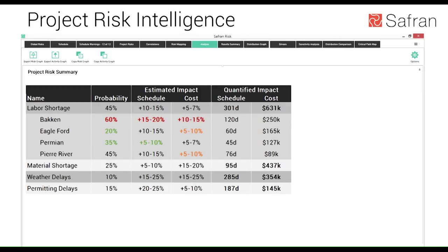From there, we're able to roll those results up, from a project level up to an enterprise view. That allows the organization to understand the impact of those risks across all projects. The benefit to the organization is that within their project controls or risk environment, they now have better insight into what those risks truly are, what their impact is to the projects themselves, and, at an aggregate level, what the impact of those risks is to the organization. It allows for much better strategic mitigation options, because we're no longer limited to mitigation, risk treatment and risk management at the project level. We now have insight into how we can do that at the enterprise level.